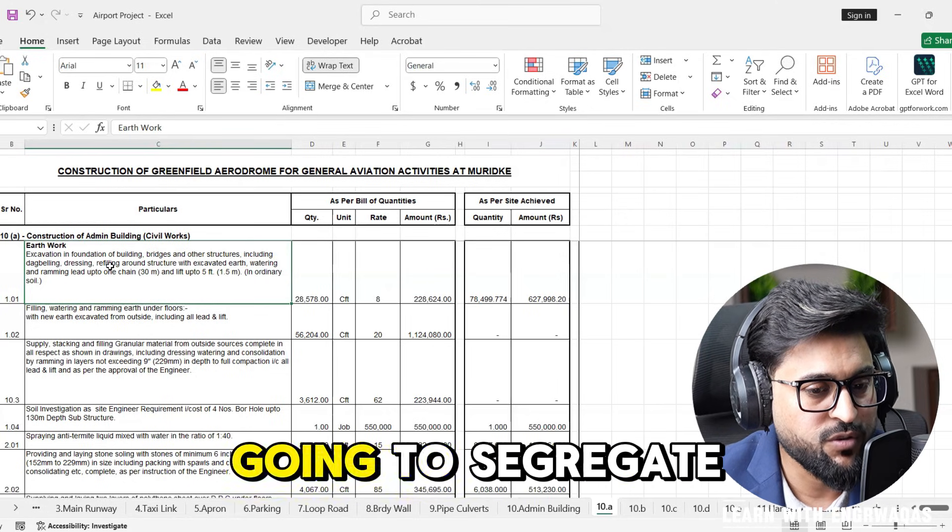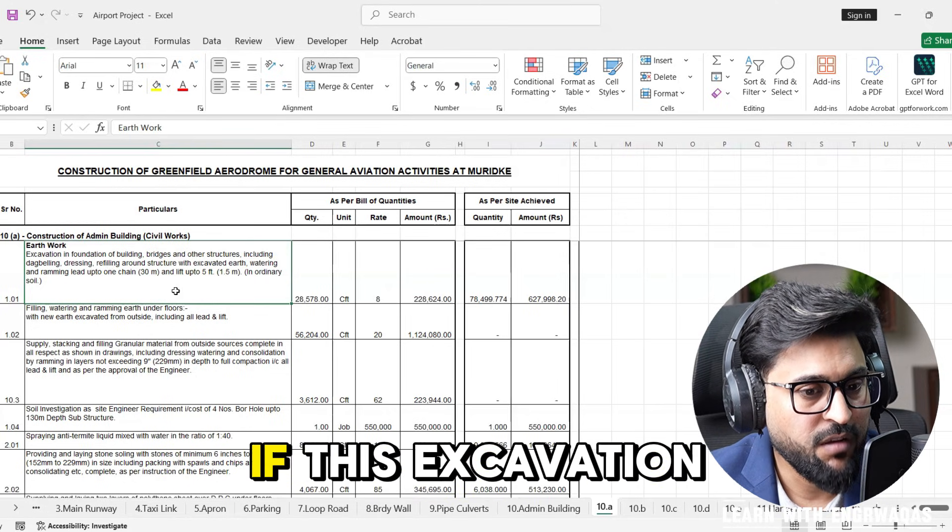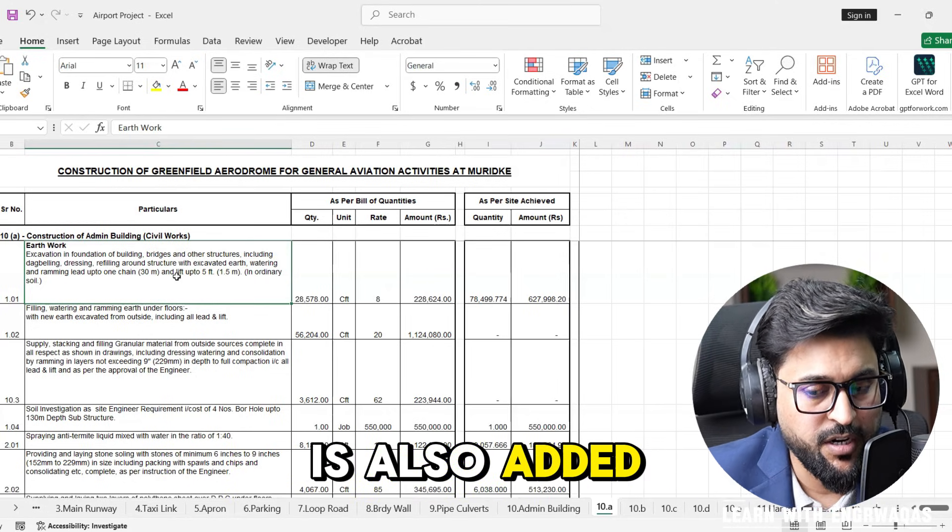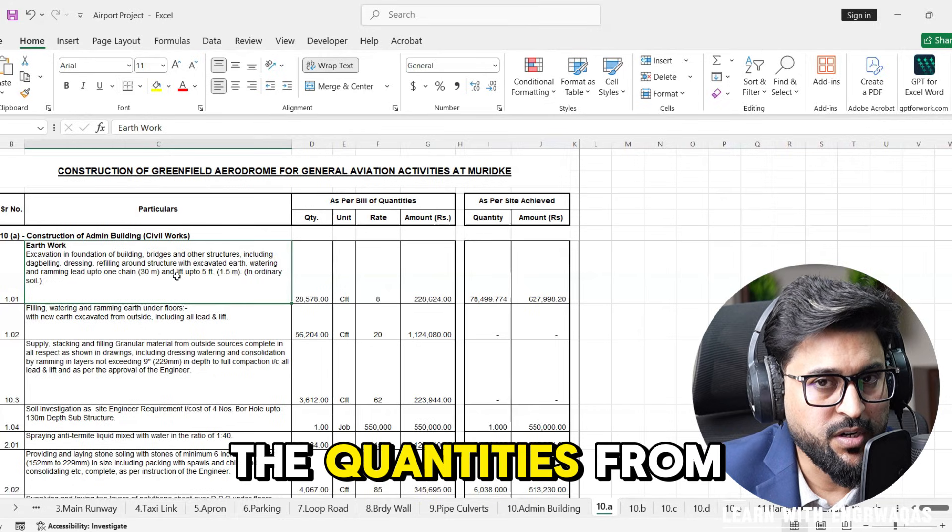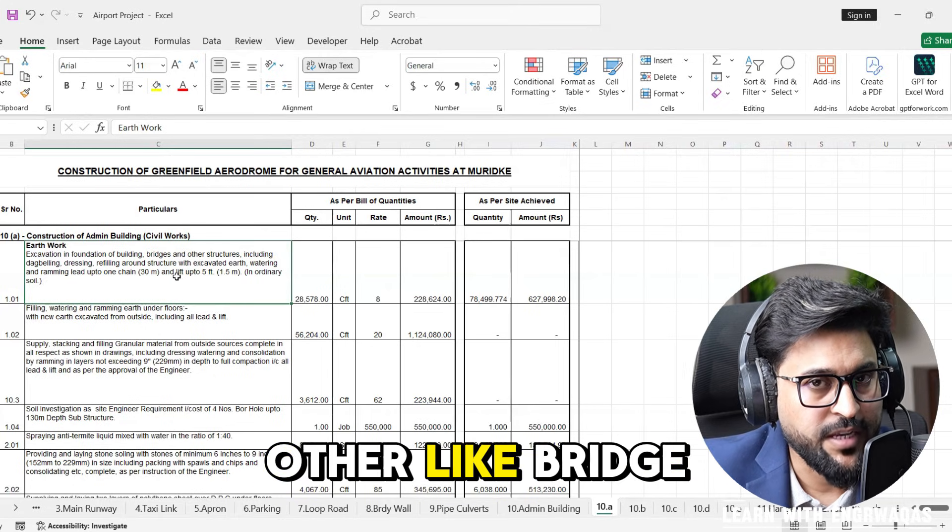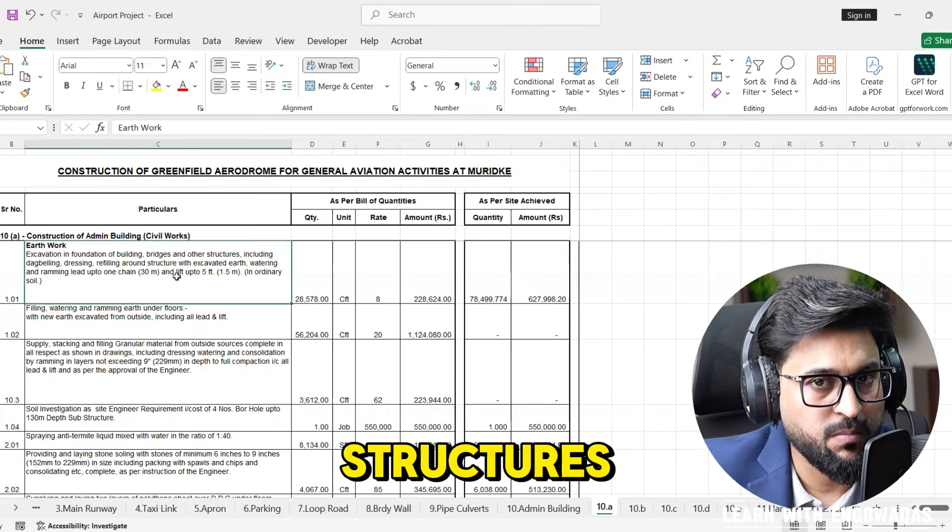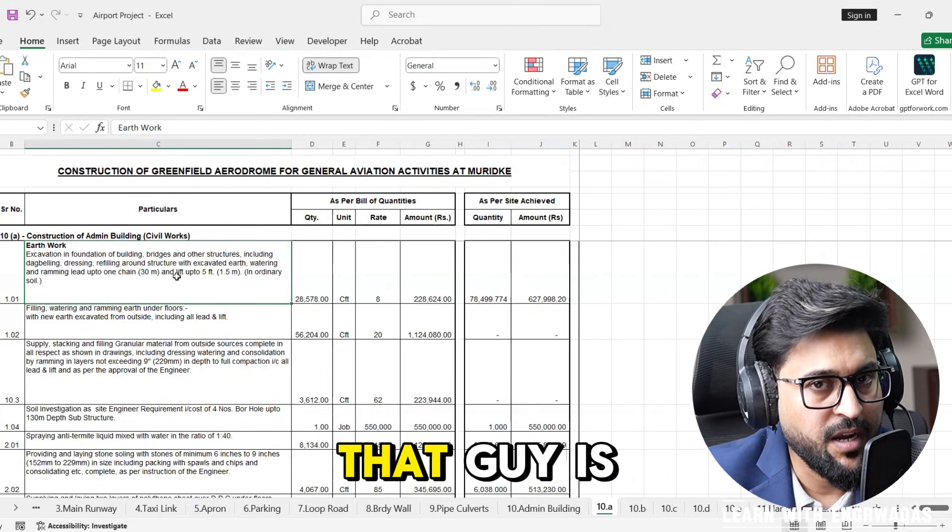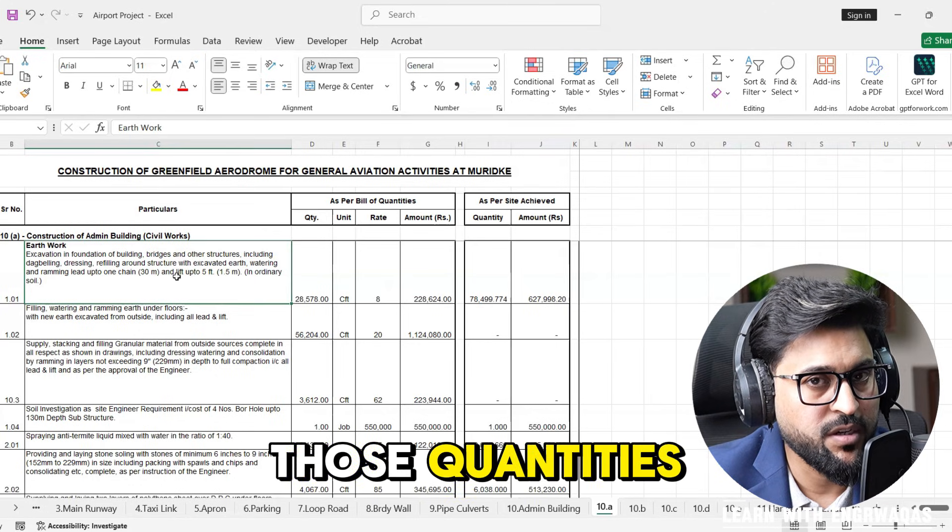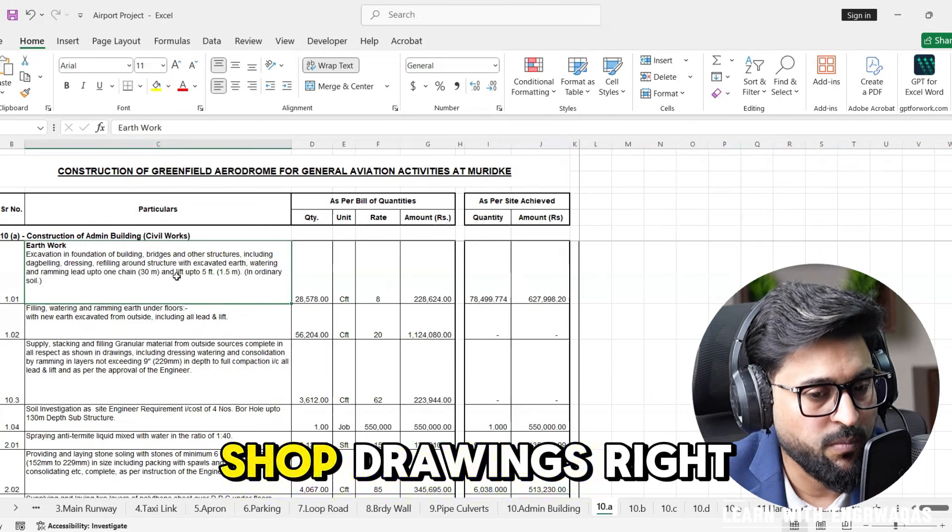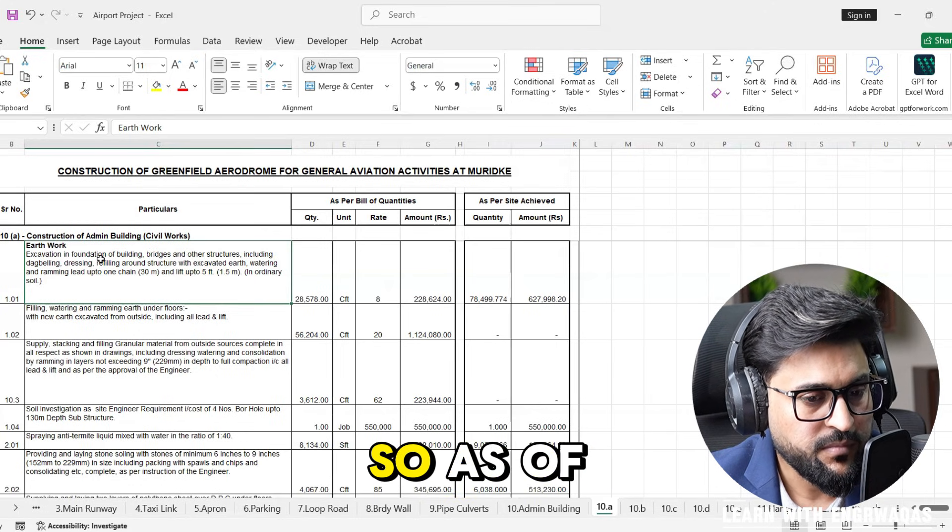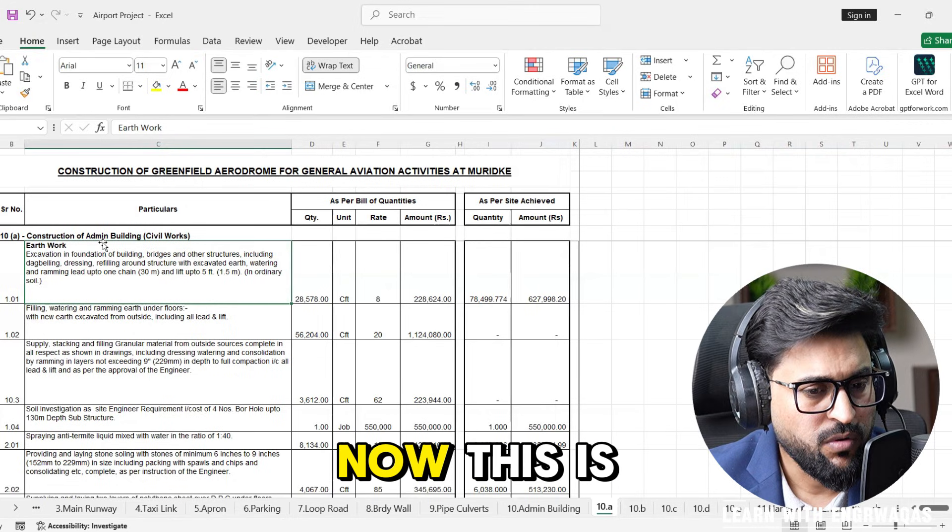Why is quantity surveyor there? To assist planning engineer. They are going to segregate if this excavation quantities are also added from other structures like bridge structures, building structures, so that guy is going to segregate those quantities as per the shop drawings.